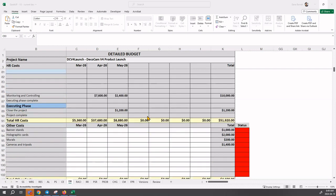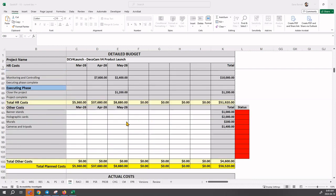Now there is some work that you need to do here, which is the other costs. Gantup knows that there are other costs - the banner stands, cards, murals, cameras and tripods - those were identified in the cost estimates sheet.